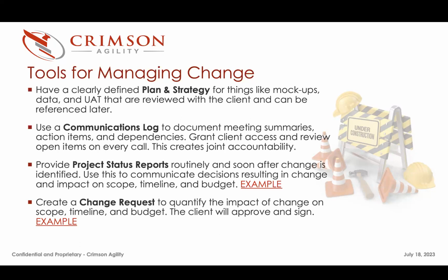And then with Scientific Sales, they went grossly over budget because when we launched, there were just so many things that the customers through Punchout couldn't test through their Ariba, Coupas, their ERPs. There were just so many hot fixes that we had to do on the fly, and a lot of design changes and tweaks that were a deviation from the original mock-ups that had been approved. But at that point, he just didn't care. He just wanted it to look better. But it was more like, I'll do what you want me to do, but just know that it's going to increase the cost and we'll get it done.